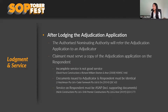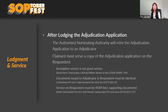Briefly touching on case authorities around service. First: incomplete service is not good service. In one case, the applicant hand-delivered the application in a box, and it wasn't until after determination that the respondent realized they didn't have a complete set of documents given to the adjudicator. The Supreme Court held the determination by the adjudicator was void on the basis that the respondent didn't receive a complete copy of the application.